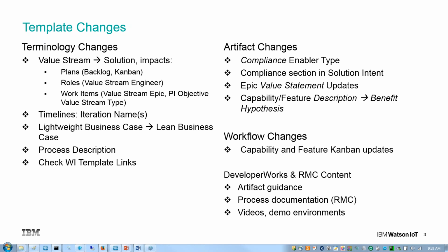We put it after the platform train, but we created like a special squad with all the ceremonies, doing planning and everything, that will deal with the DevOps and the continuous integration. So they will build the infrastructure, and then they will feed it back into the different trains. So it's complex. It's not easy to use shared resources.